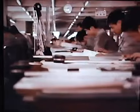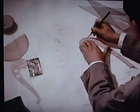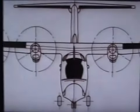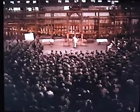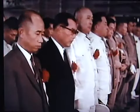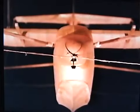In 1958, the design concept for a combination of spray suppressors and high-lift devices was decided. The soundness of the design concept was demonstrated in the test flights of the UF-XS, an experimental flying boat built on a reduced scale of 3/4 of the PXS, and the basic design was completed in 1964. In 1966, assembly began of a full-scale structure for strength tests. Various tests were conducted to check performance and design until the completion of the final design.